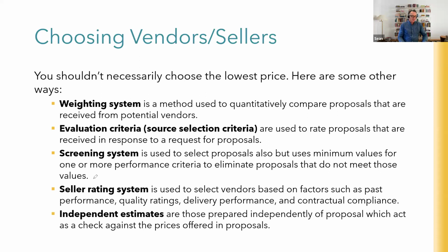But in saying that, I certainly know that my company will respond to certain RFPs, and they make it clear that if they choose you, they're simply going to sign the document and that's it, it's all done. But I know other RFPs that we've responded to, they make it clear that the selected vendor will then be negotiated with for the form of contract as well. So you'll have all of this in your internal procurement policy. So please, I cannot stress that enough, follow that.